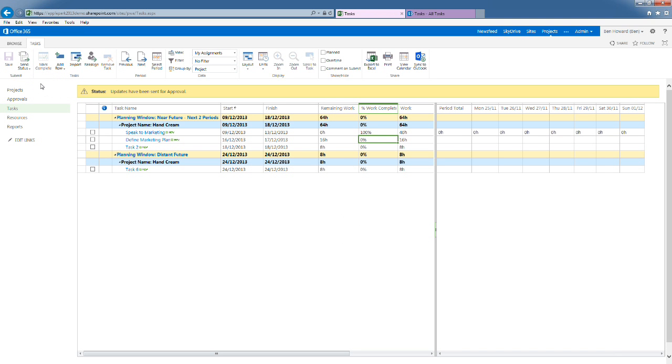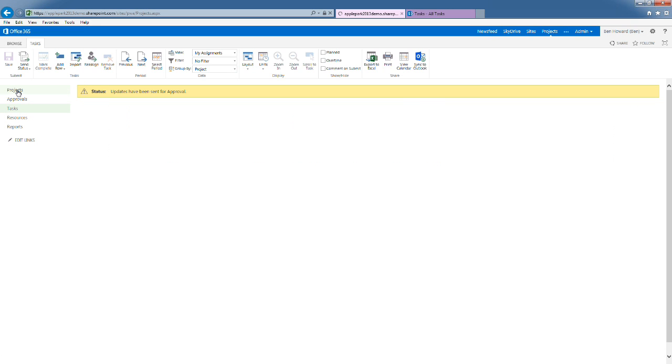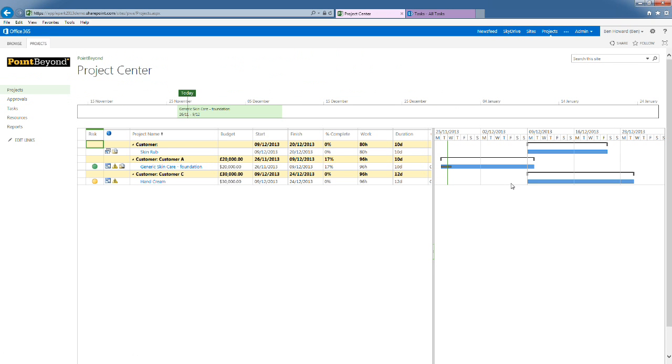That goes to the project manager, and that project manager now knows that that task has been completed, and that will be marked as completed within the project once the project manager accepts it, and we will therefore get a black line, a percentage completion coming through on the line here. Does that make sense? That's very good, Ben. Thank you.